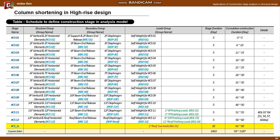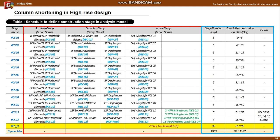The following is a table that organizes information to create a model for construction stage analysis. The first column sets the name of each construction stage, and there are a total of 14 stages - one stage for each story, plus the stage where live load is applied and the stage where three years pass after completion of structural construction. The following columns contain information about the grouping range and name of the structure, boundary conditions, and loads by each construction stage. The right column shows the duration for each stage.